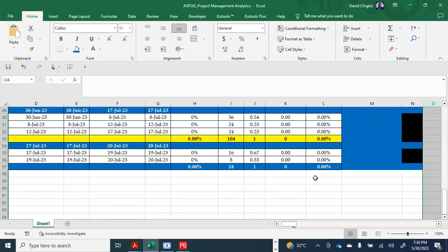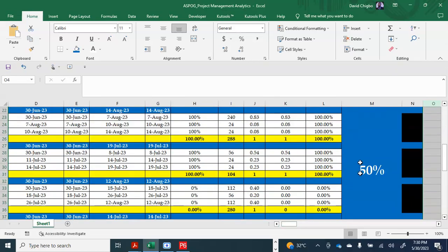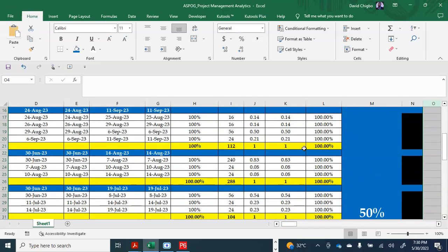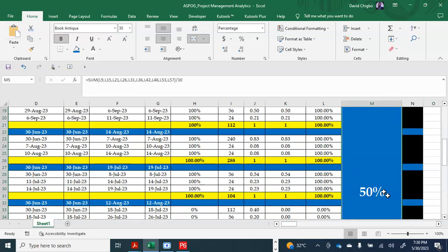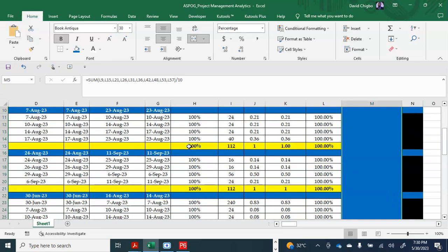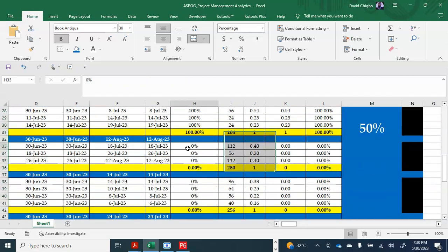So this is how you report your project in real time. Let me quickly check if this application is working. If I add every percent complete as 100%, this overall is supposed to be 100% complete. If it's not, there's something wrong. So we've done all this side 100%, 100%, 100%, 100%. Let's try and check. It's not 100% complete. There is something wrong.